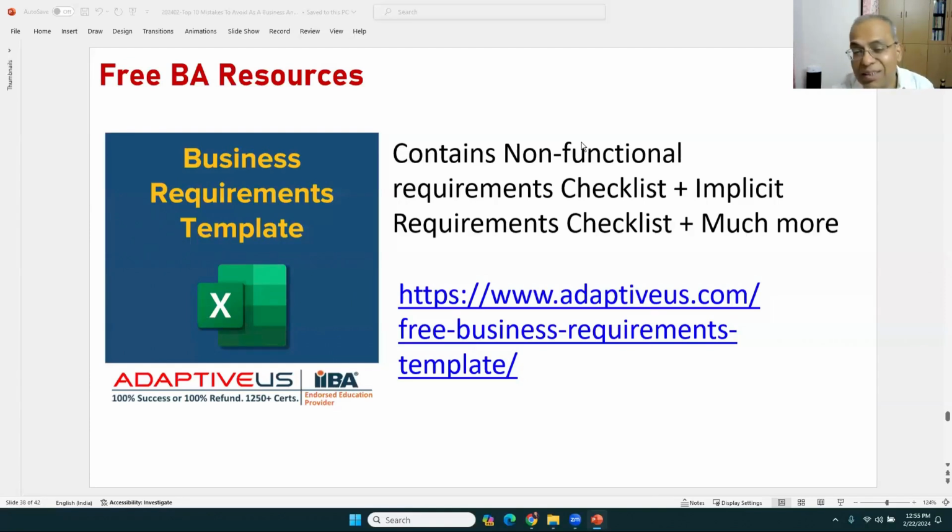Somebody asked, how do you handle silent stakeholders? Maybe one technique that works quite well in this situation is something called a stakeholder charter. In the stakeholder charter, you can make it very explicit, asking stakeholders to raise objections early. That means they should not be raising objections at the very end of the project, where it becomes hard to take their requests.